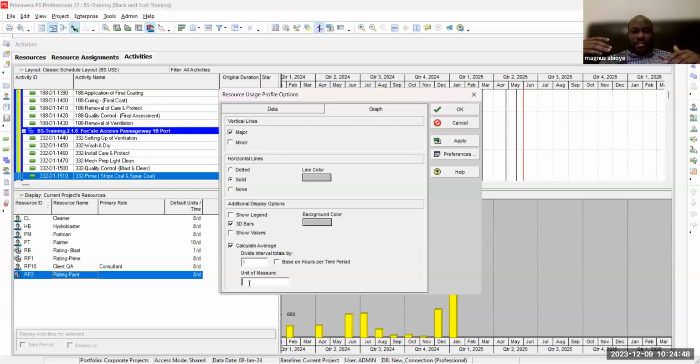And that would require calculations like, okay, we need 10 people on site. According to the plan that we have, we need 20 people on site per day. 20 times 8 hours a day. So this is a rough estimate. 20 times 8 hours a day, which is 160 hours a day. So I can just put 160 hours per day, but this is per month because this is month.